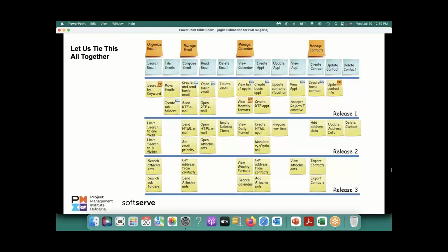All right. Okay. Do you have any tips for defining initial team velocity when you have no previous data? Yes. So you don't have any previous data. That's right. So what you do? Let's say this is your first sprint. You don't have previous data. So you can talk to the team, and you have your story points for each of the stories. Now you're trying to figure out how much we can do in this sprint, and that will constitute your velocity, number of story points delivered.